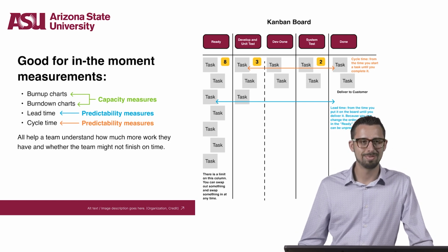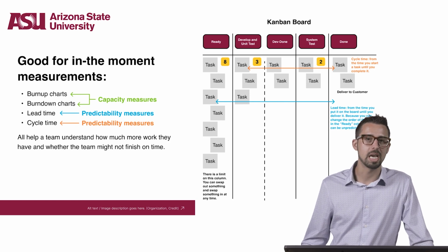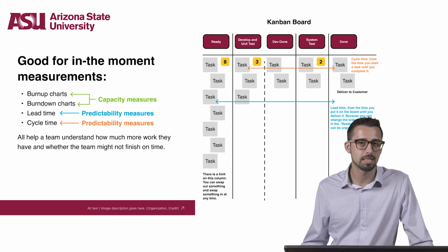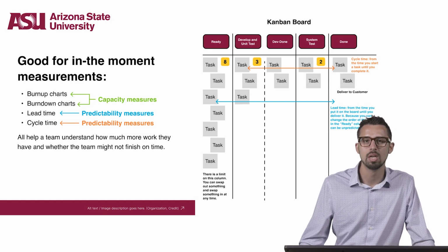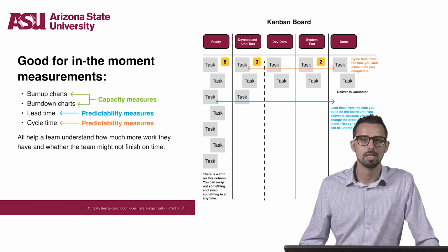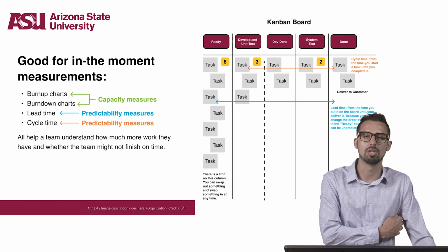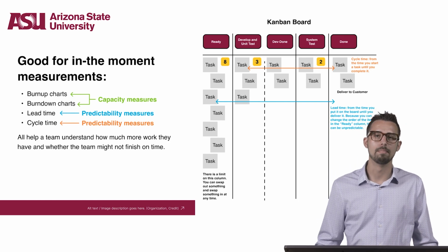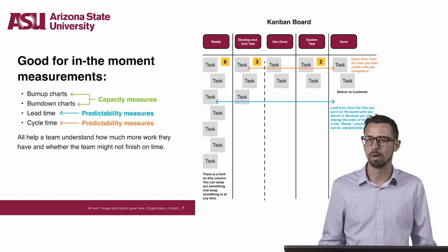That is just the nature of the work. So if the project manager wants to see a faster throughput of tasks, they can sometimes break those tasks into smaller micro tasks, or work with the team to push those tasks through a little bit quicker.